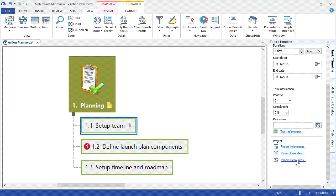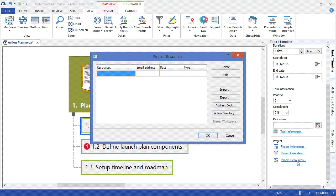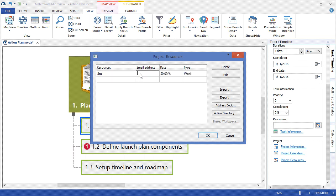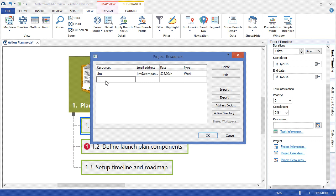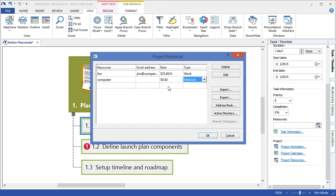Project resources would be the people or materials that are working on the project. By selecting the project resources link, I can choose to add resources. I can include that resource's email address and associate a rate for that particular resource. MindView also supports material resources such as computers or high-end equipment. To add a material resource, I simply choose the type under the drop-down, choose material, and then add a daily or unit-based rate.